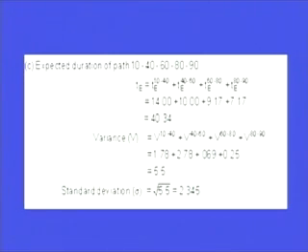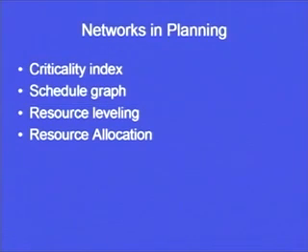because sometimes this is such a dynamic scenario, we need to add on certain activities which may creep into the complete project. So in order to keep that kind of flexibility to incorporate certain other activities into the network, we sometimes keep the names as 10, 20, 30, 40 like that. Now we use the networks in planning.